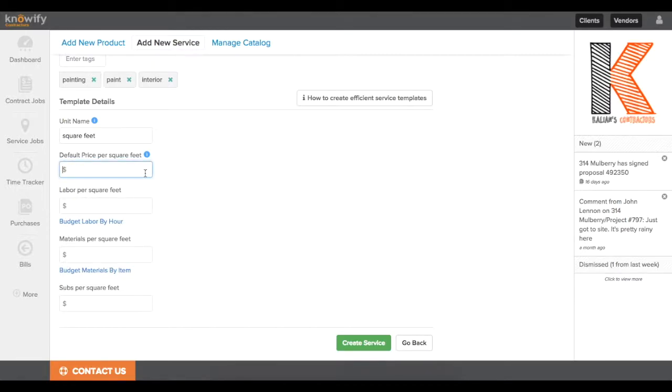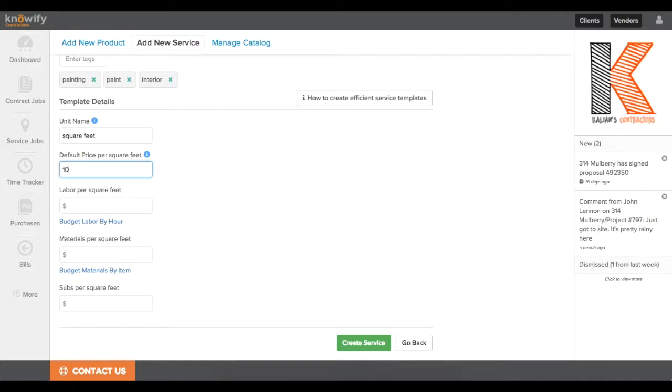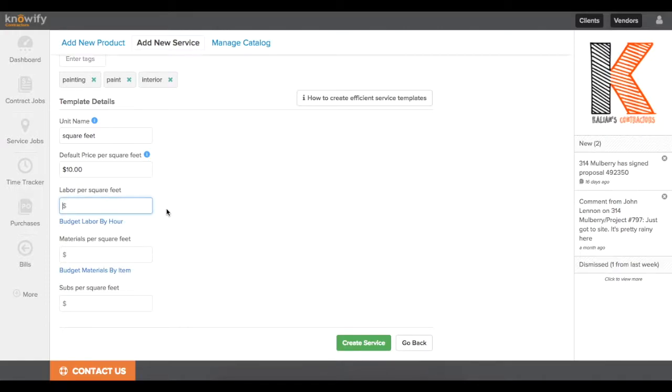And the next thing it's going to prompt me for is the default price per square foot. Now just to clarify this a little bit, this would be where you enter the price if you offer it as a service that doesn't involve budgeting that you see below. So if you don't want to mark up your budgeted cost and you want to just say $10 per square foot, you can quote a price to the client really quickly using this, but we're going to focus on putting in the budgeting values now.